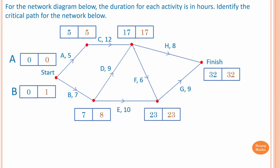Let's identify the critical path for the network below. We have earliest starting time and latest starting time. If you don't know how to find these, please go to the description below and click on the link. To identify the critical path, we need to find activities where float time equals zero — that is, latest starting time minus earliest starting time equals zero.